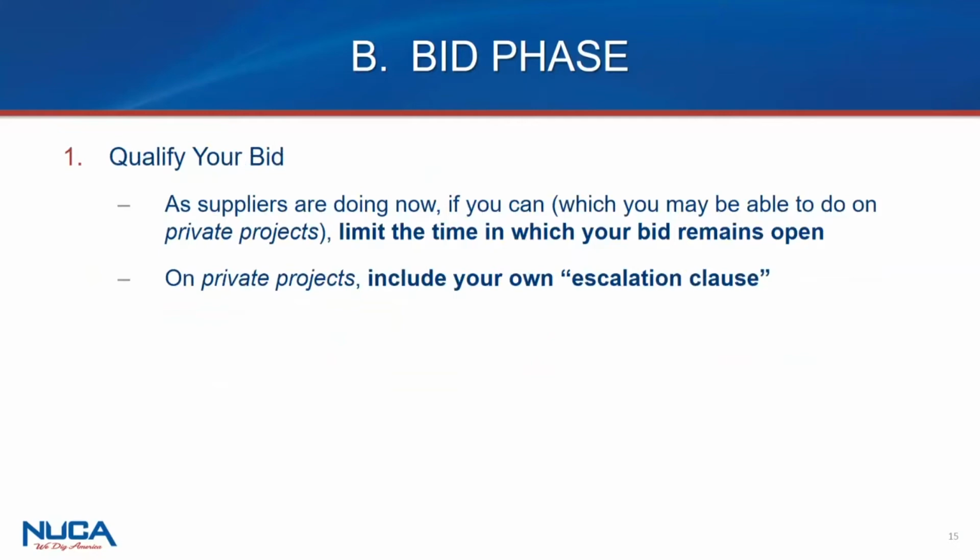So certainly on a public job, generals and subs can't qualify their bid. I mean, I guess you could as a sub, but if I'm the general, I wouldn't accept your bid. If it's conditioned upon only being awarded on a date that doesn't align with the date that I as a general am going to get the contract, I think it's probably going to be rejected. Certainly as a general, you can't qualify your bid on a public project to the owner.